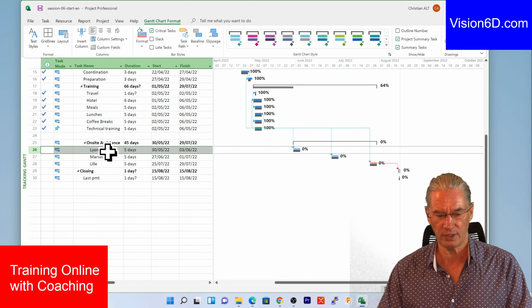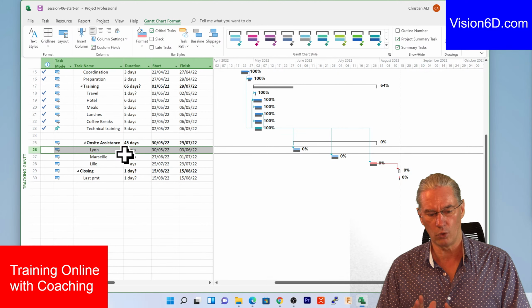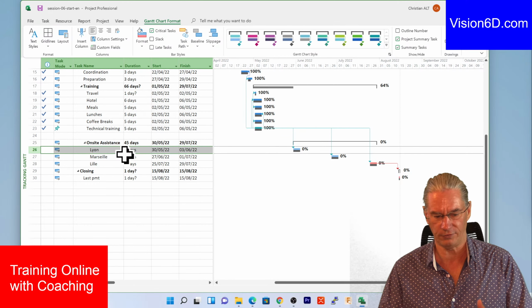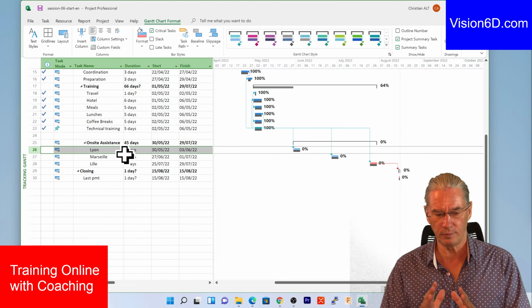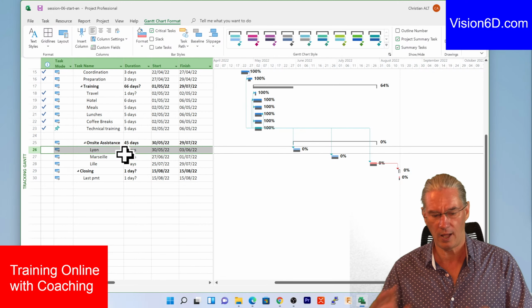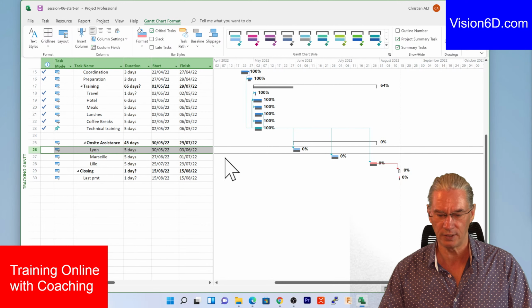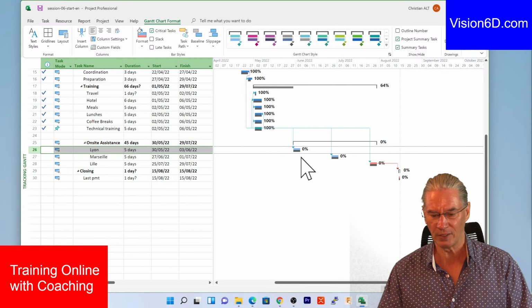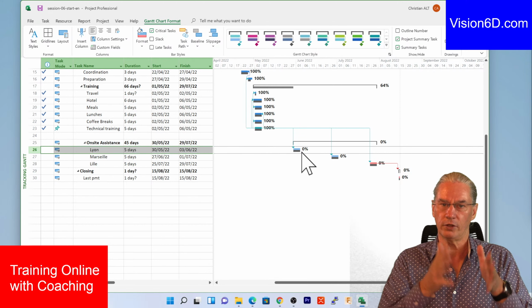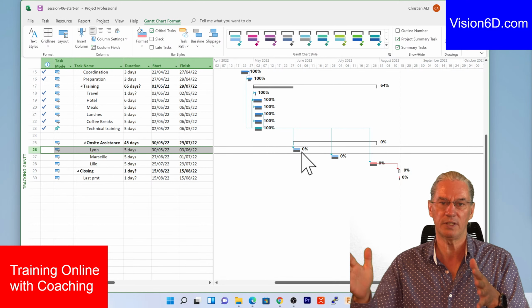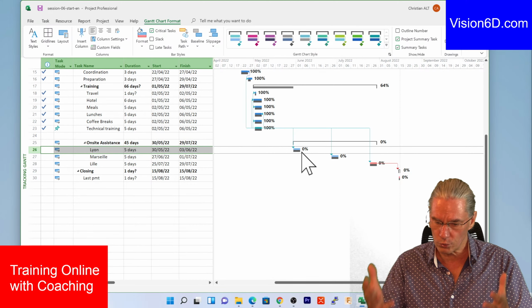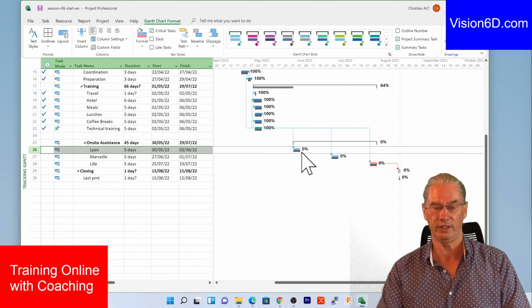And what we noticed is that in Lyon, it lasted a bit more. The consultant went there and he had to come back the week after. So this wasn't planned, but we could expect this in a project. That's why we've also left margins here in between. We don't rush to do one location after the other one. We leave a bit of space like that. We can get feedback or give room for consultants to do more interventions.